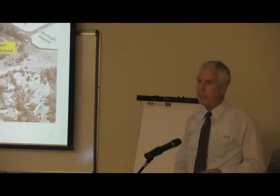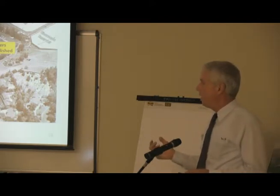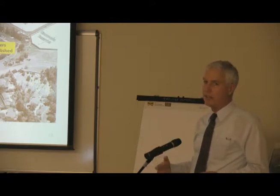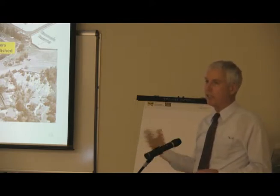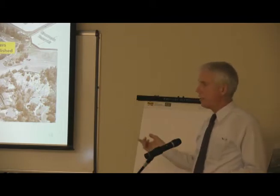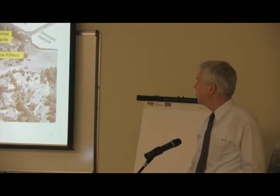And this goes back again to the 24/7 operations. We can't afford to say, oops, the clarifiers are demolished, and oops, the flock sed basins don't work, and we need to send back to the manufacturer for some parts or something. It has to be up and running, and it has to be thoroughly tested, and we have to have enough confidence that we can go offline with the clarifiers.